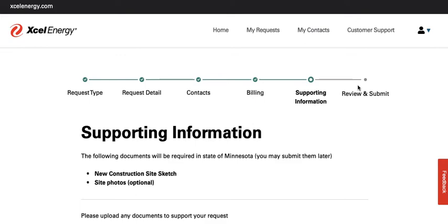I want to thank you guys for watching this tutorial, and would like to just leave with a quick explanation of why the homeowners apply for these and not the project managers, us here at Moderno. The reason being that we have found this to be the best streamlined process from the commencement to completion of construction all the way through. Throughout the process, utility bills will come in periodically. It's less cross-transfer to have those come into the office and then us bring them back to the homeowner, and so on and so forth throughout the process.